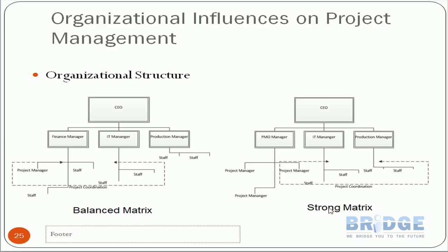In this structure, the project manager has more power than functional managers, and functional managers may even report to project managers within a project. However, one disadvantage is that if the organization has few or no projects, these highly paid project managers may be idle. You must ensure there are enough projects to justify maintaining a PMO.